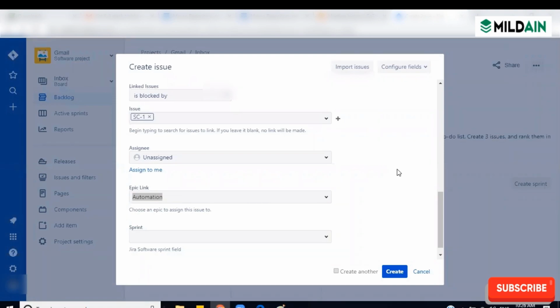But unfortunately, if you open the story and you see the version number as 1.3, but you all know you are in the 1.0 version, then you can ask the product owner. If this is a 1.3 story and he kept it on the top of the backlog, then definitely that could be his mistake. He will revert it back to the bottom, and only 1.0 stories will be pulled to the top of the backlog. That will be his headache.